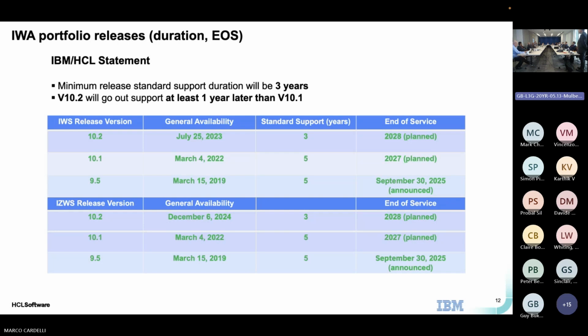We would choose a version, and we would find that version has a number of bugs in it. So we would have to wait for the next fix pack, but that has a number of bugs in it too. Then we have to wait for either a mini fix pack or patches to that fix pack. So by that point we're already 6 months into our 3-year cycle, because the first release isn't stable enough to allow us to deploy.